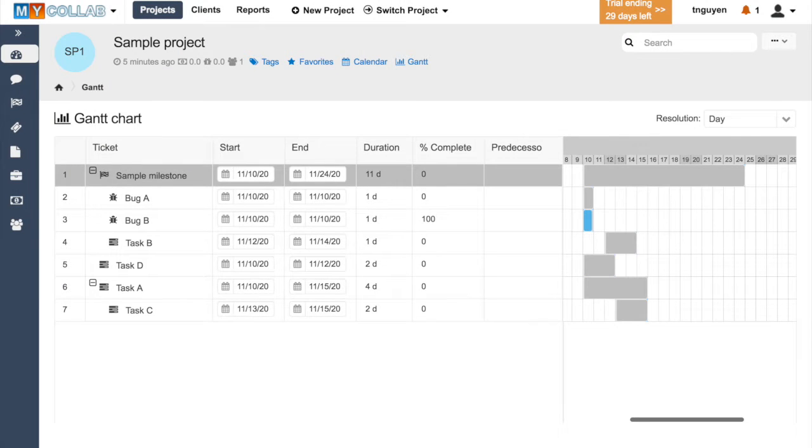Similarly to Microsoft Project, MyCollab has the Gantt chart function. A con about this software is that MyCollab is not able to calculate slack time between tasks and the critical path of the project. Although it's still very useful, the chart is not as extensive as Microsoft Project, making tasks difficult to see on the chart. It does, however, list out all of the project tasks and milestones very nicely and shows the work breakdown structure extremely well.